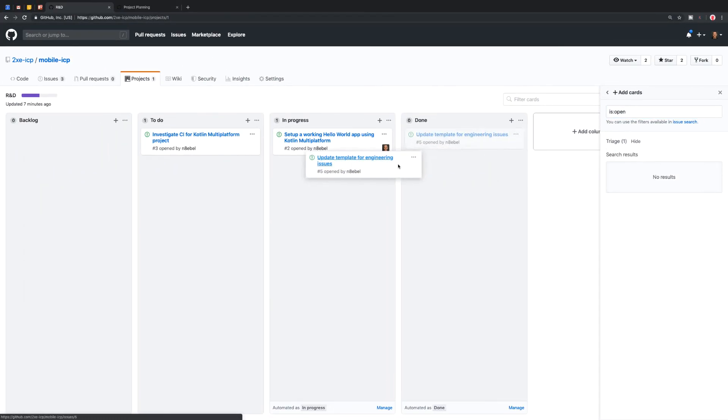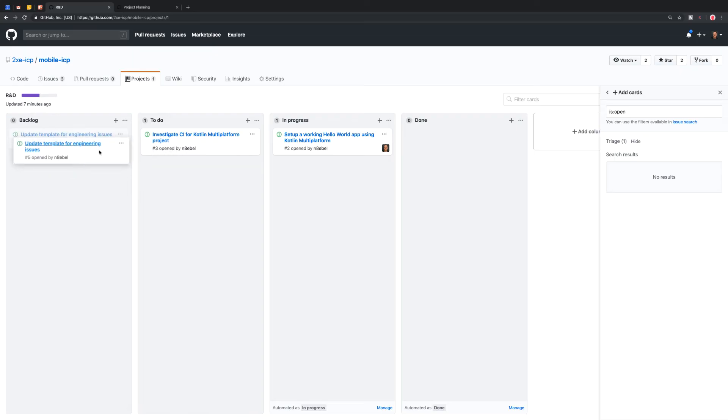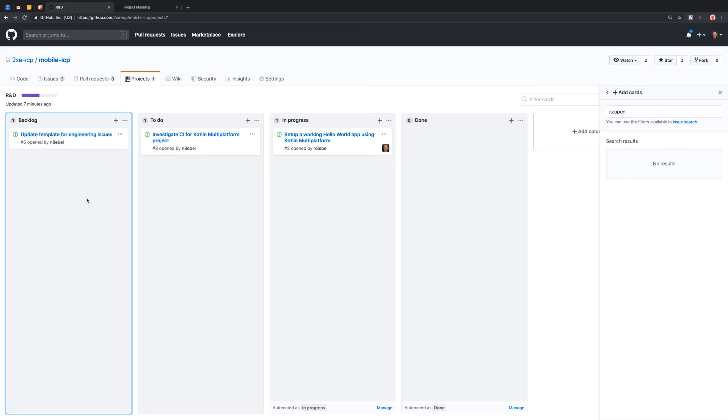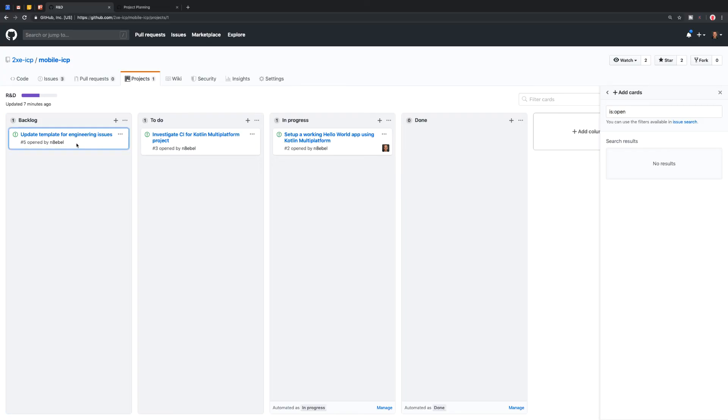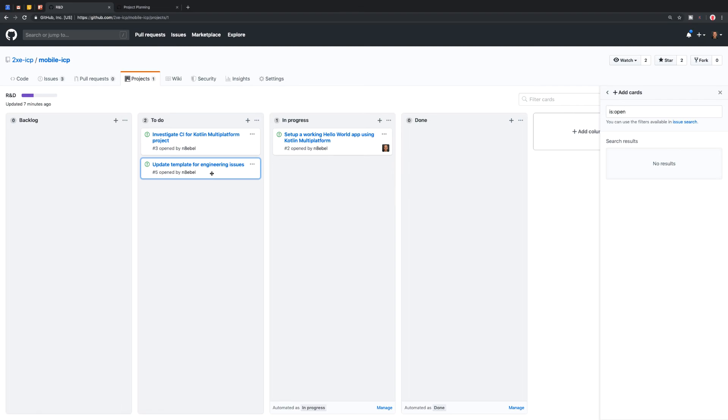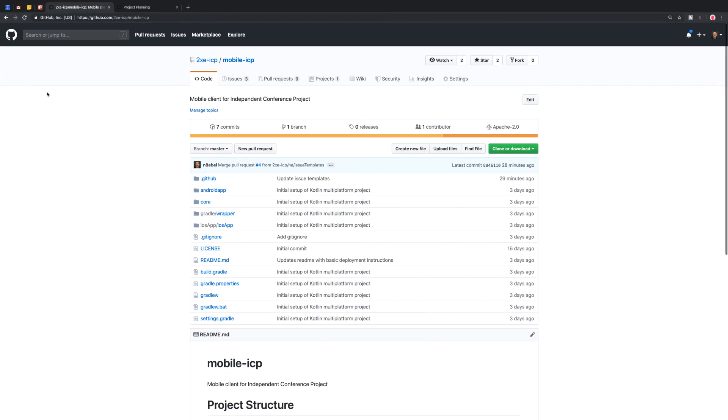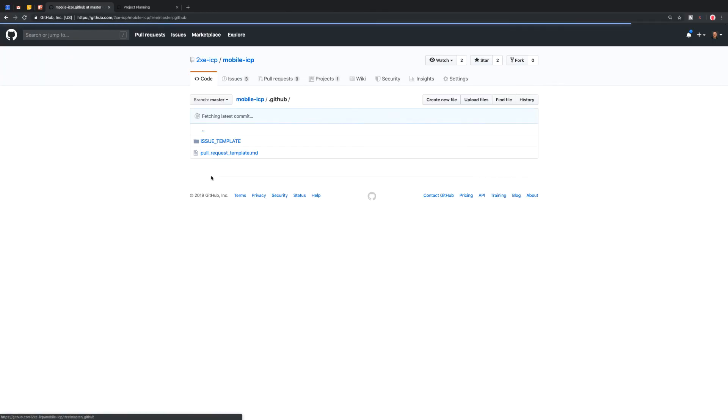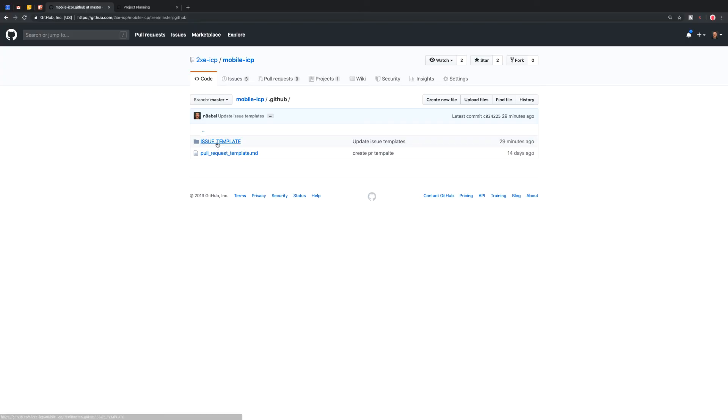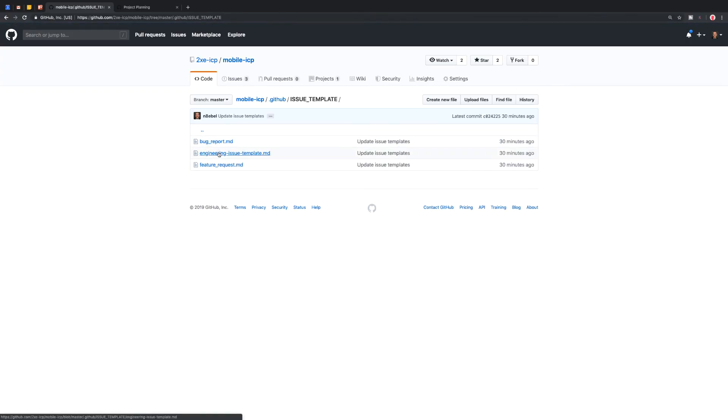So for me, initially I might put this in the backlog and then when I was ready to actually start working on it, let's say during our planning or something, I might move this over here into the to do section.